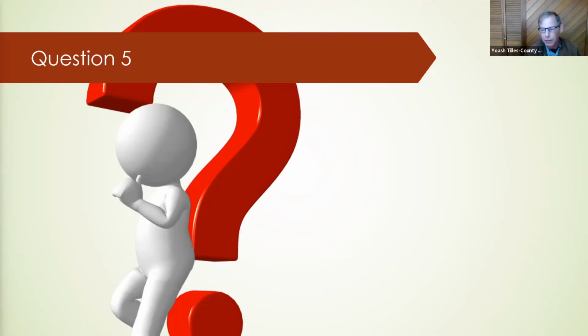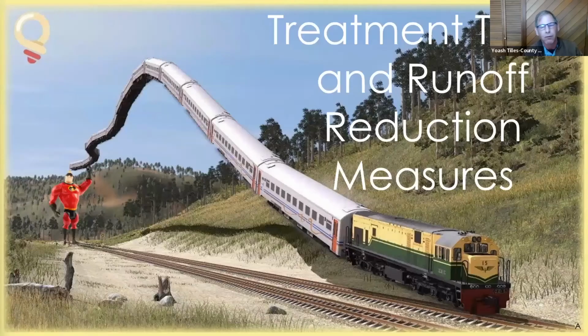The credit, if taken, must be between the pollutant source and the low impact development BMP. The treatment component must be located between the pollutant source, say the new driveway or the house, and the low impact development BMP, with no obstructions in between, and must be maintained in perpetuity in the same manner without modifying the configuration, say pouring a concrete pad after 10 years over the vegetated buffer area, which is the reason for having the maintenance agreement signed by the owners of the property before construction is final, so they are aware.